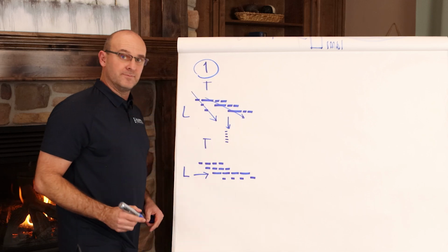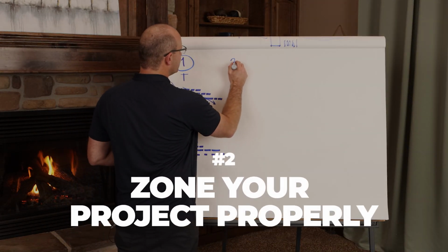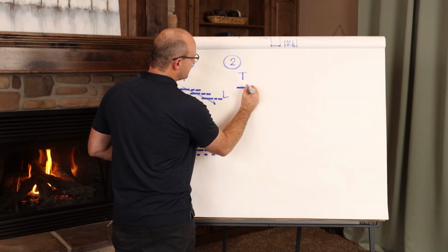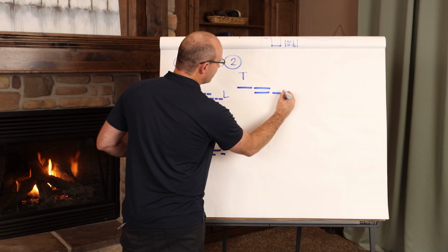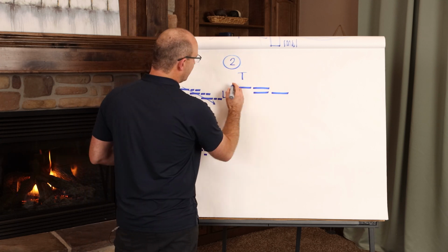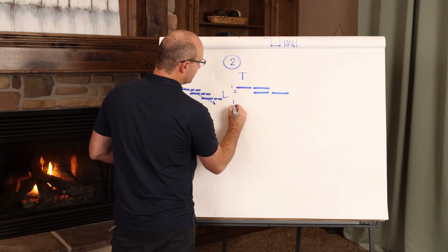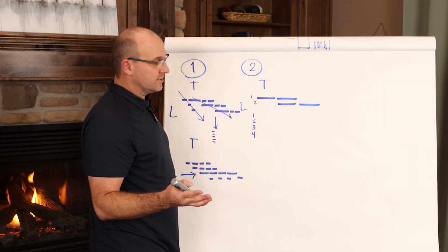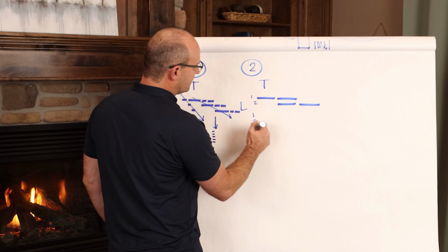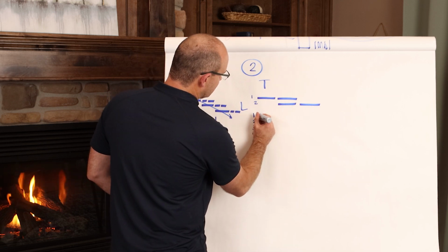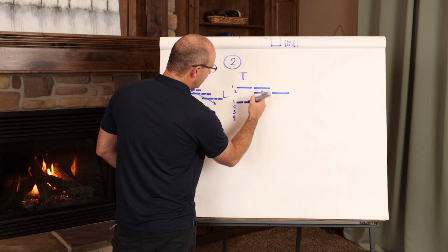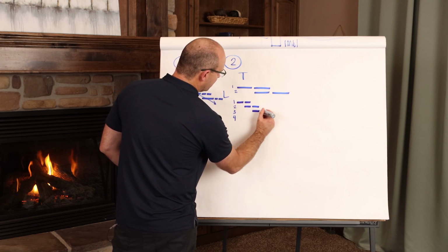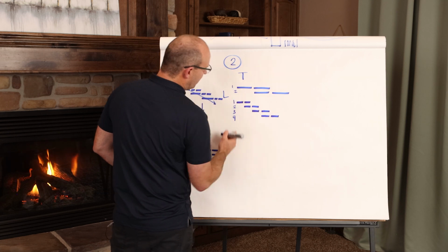That's strategy number 1. Strategy number 2, on a project, you've heard me do this a lot, but in a time by location format, let's just do this simply here. If you have 2 zones, and I'll just show it right before your eyes, that's 1 and 2. If you switch to 4 zones on your project, you can obviously see that all the zone sizes would split in half, so your duration would split in half. So I'll just go ahead and draw this as half, and then the second activity here would be half, and then this would cascade down, and it would be this exact size, and that's all 4 of the zones.